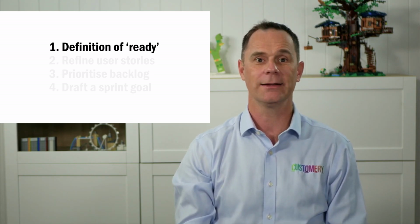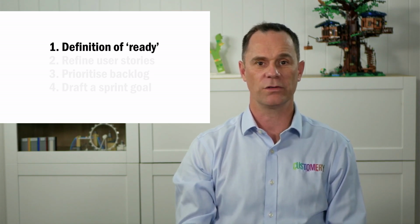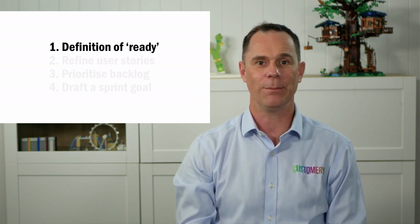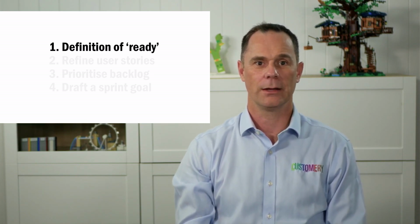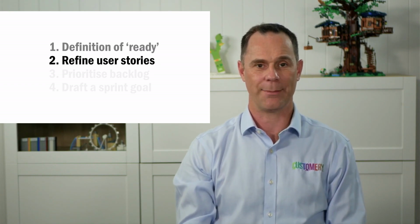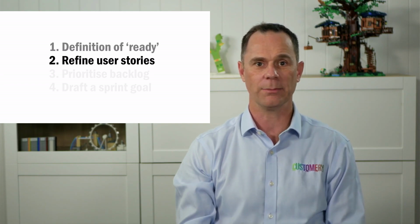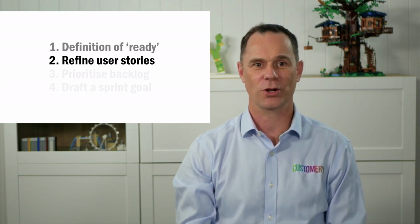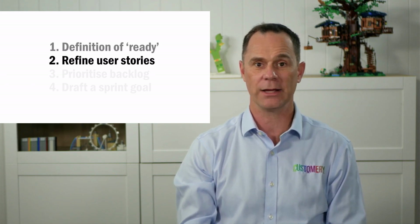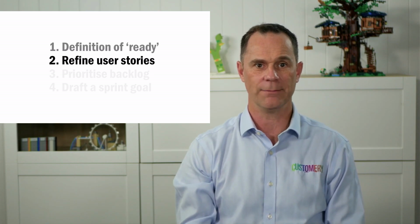Like our definition of done, I recommend defining your team's definition of ready before you start sprint 1 and refine it as necessary. I'll share an example with you in a moment. We run storytime workshops prior to sprint planning to elaborate our user stories. In Scrum, this is known as backlog refinement. During storytime workshops, the product owner and subject matter experts help the developers elaborate and refine the user stories until they meet our definition of ready.